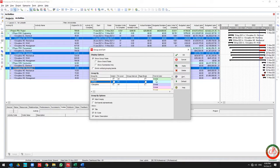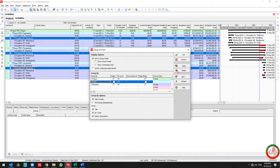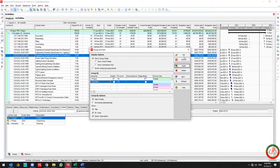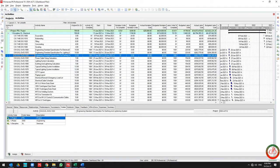I know you can calculate it in Excel, but the easiest and most accurate solution is to use the software. You need only remove the phase level, then apply it, then press OK.